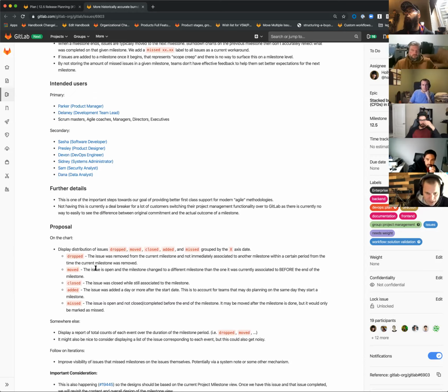we take a snapshot of the state of all the issues that are attached to this milestone, like which ones were dropped, so it was removed from the current milestone and it wasn't assigned. So it's more like we're abandoning this. We're not going to reprioritize it. We're just going to drop it. Moved, so it just gets moved to another milestone out of the current one, the context we're in.